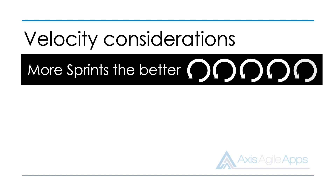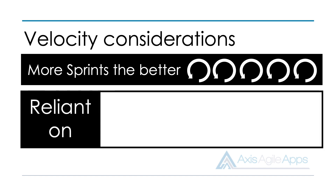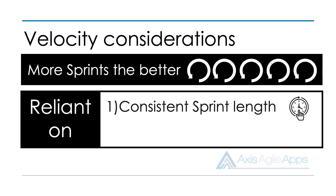Secondly, to make sure your velocity metric is reliable, you will need to keep two variables consistent. The first variable is the team sprint length. If your team is in the habit of chopping and changing their sprint length, your velocity will go up and down — it will not be reliable. In the early days of your scrum implementation, it's okay to experiment with sprint lengths. But once you decide on what works for you and your team, stick to it. A consistent sprint length is very important to making this work.